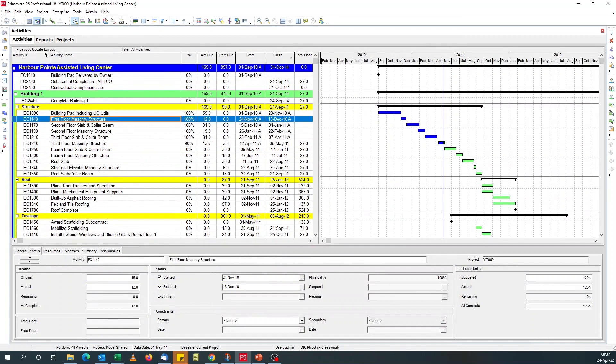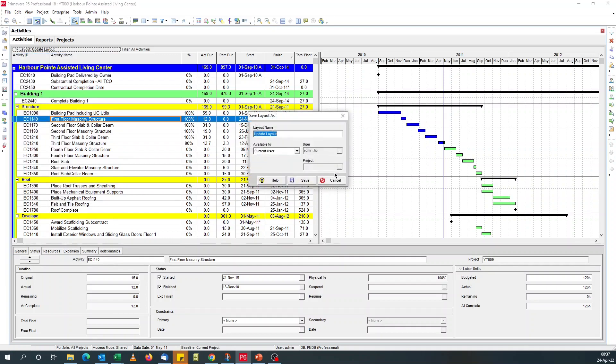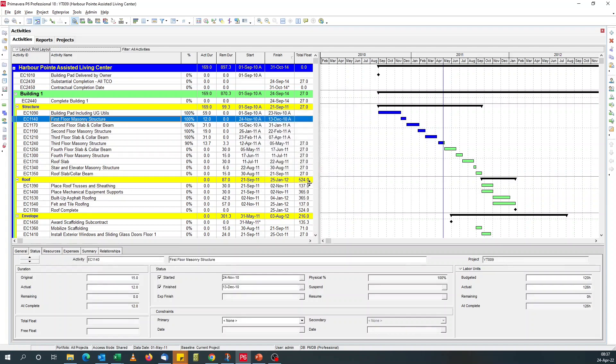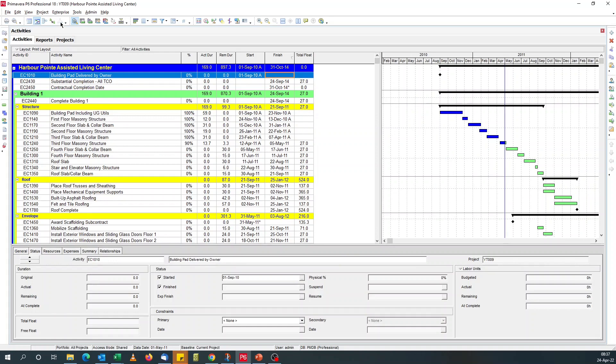First of all, I'll suggest you have two layouts, one for your normal updates, for when you do your updates, and the other for your print layout or your display layout. So I'll call it print layout. So I would need to do that to remove the asterisks and these blank fields.